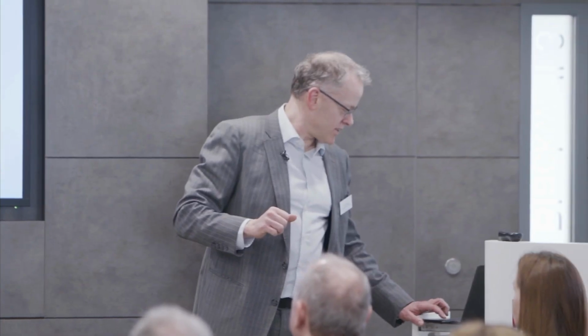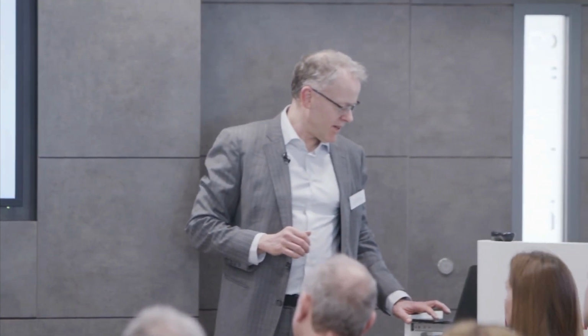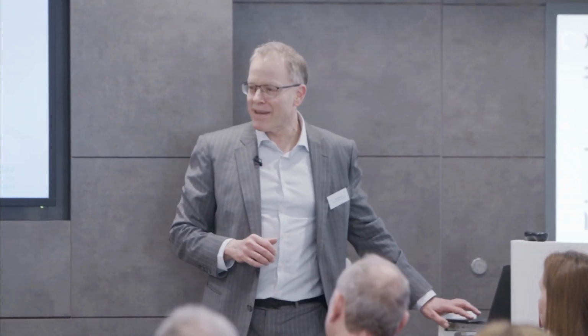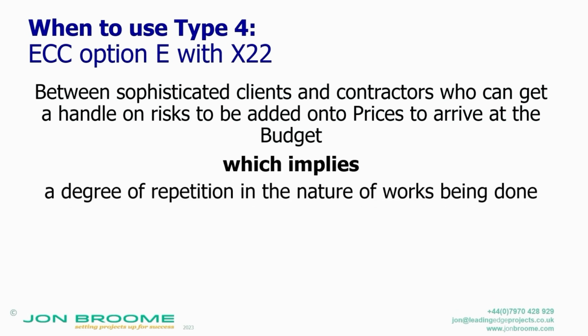So when do you use it? Between sophisticated clients and contractors who can get a handle on the risks to be added onto the prices to arrive at the budget. That implies a degree of repetition in the nature of the works. You're not guessing at the risks, because you've done work of this nature before.